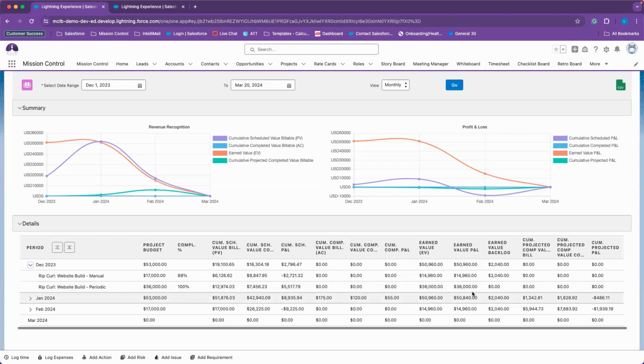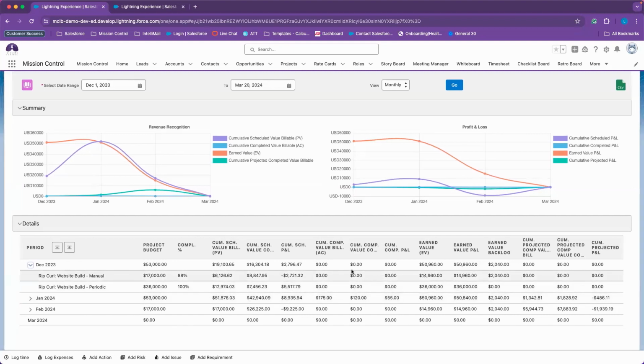My completed values look like they have not rolled up. So in order to review this, I would most likely check my time logs. It looks like I might have completion set up by updating my actions to complete. But if I do not log time, then I'm not really assuming that revenue from my resources. So that's going to roll up here.